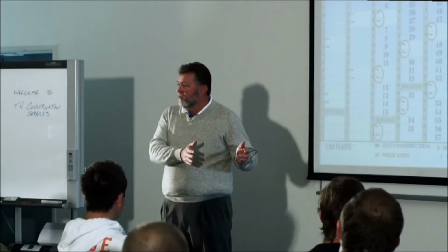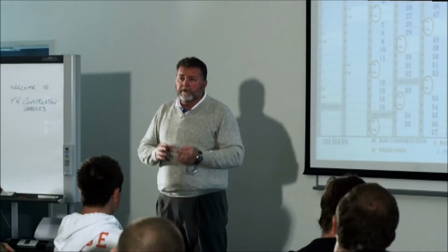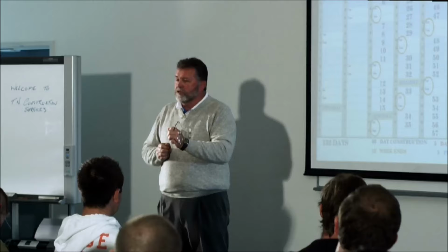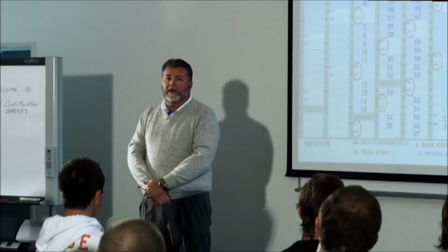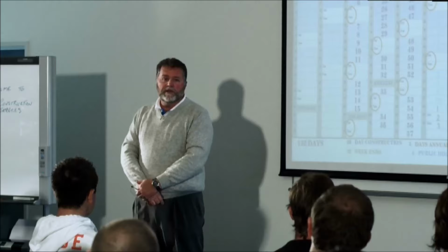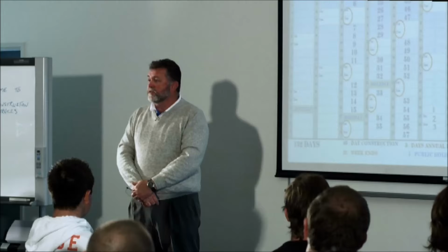We've actually had a situation down the Gold Coast where an owner and a builder were at major loggerheads. The owner said, I don't care, I want you to get material there. They actually took the tiles out there on a truck, and there it sat for 5 days up to the axles. The builder then went back to the owner and said, thank you, now you're going to incur the cost of that truck not working and everything else. And the owner backed off. The owner finally could realise what the builder was trying to say.